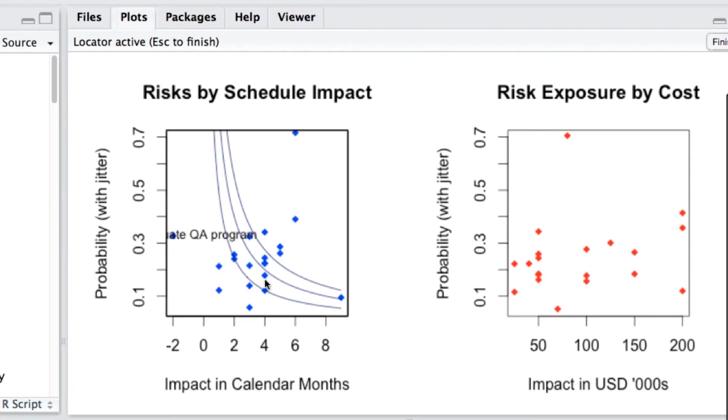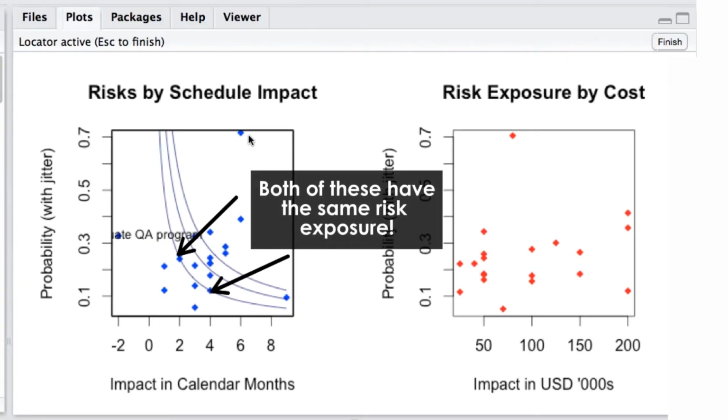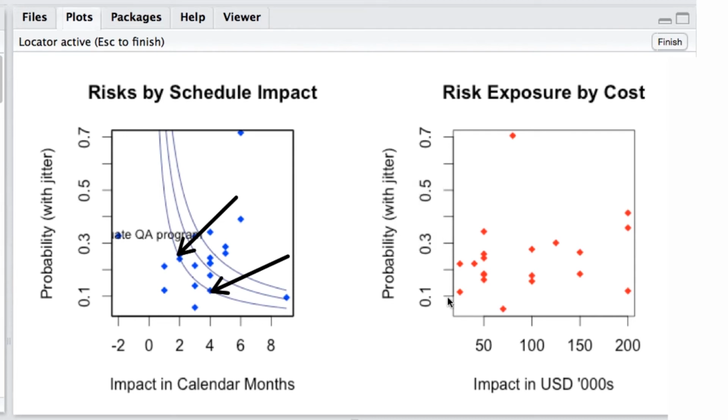Meaning the dots on the blue lines are comparable? You mean these risks, Lisa? Kind of. Given that there are a slew of risks on a project, managers must know which risk they must handle first. It's not as straightforward as the one with the highest cost. We looked at schedule impact on the left. We are looking at cost impact on the right.